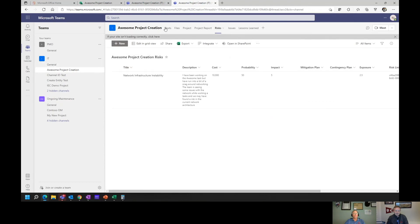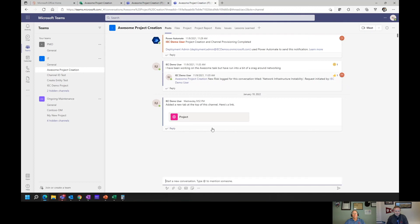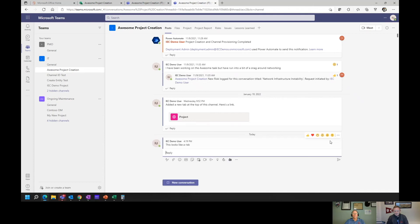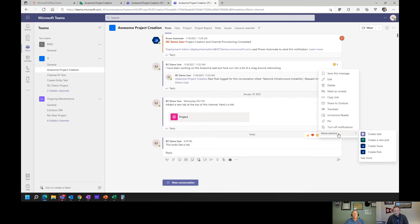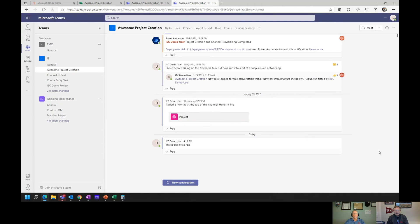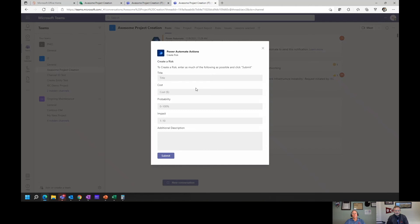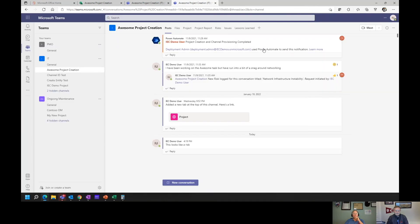In the general channel, I can start a new conversation and say, 'this looks like a risk.' Then I can use the ellipsis here, go to more actions, and select 'create risk.' That brings up a small screen where I complete a few other fields, and it goes right into that project's list of risks. So it's about proximity — taking that risk capture shorter and more direct.